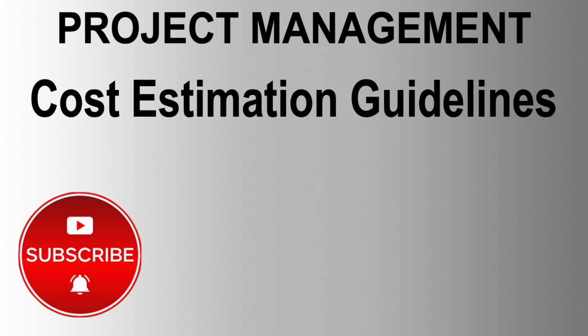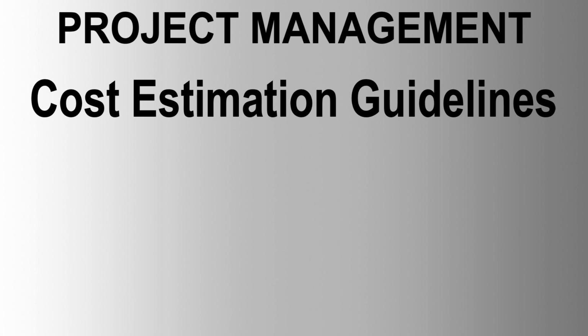This addendum to the generic recommended practice provides guidelines for applying the principles of estimate classification specifically to project estimates for engineering, procurement, and construction (EPC) work for the process industries. This addendum supplements the generic recommended practice, 17R97, by providing a section that further defines classification concepts as they apply to the process industries, charts that compare existing estimate classification practices in the process industry, and a chart that maps the extent and maturity of estimate input information, project definition deliverables, against the class of estimate.